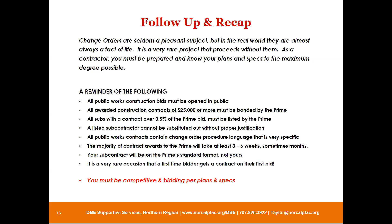Another reason a prime won't pay: the invoice is correct but the sub hasn't turned in their certified payroll. If they haven't turned in the certified payroll, I'm not going to pay them — because that's a requirement in order for me to continue to get paid by the owner. It's a contractual requirement on every contract. Taylor wrapped up the session, thanking Ed and noting that she would send out the slides, Ed's contact information, and instructions for logging into the Govology website.